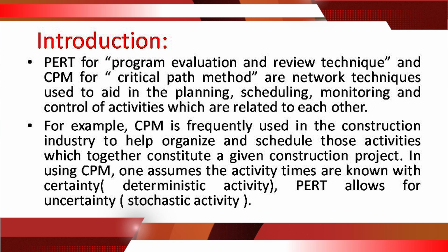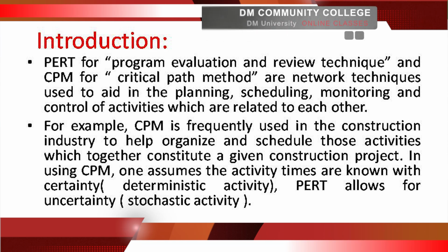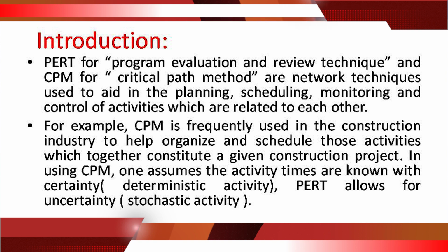For example, CPM is frequently used in the construction industry to help organize and schedule those activities which together constitute a given construction project. In using the critical path method, we assume that the activity times are known with certainty: deterministic activity.